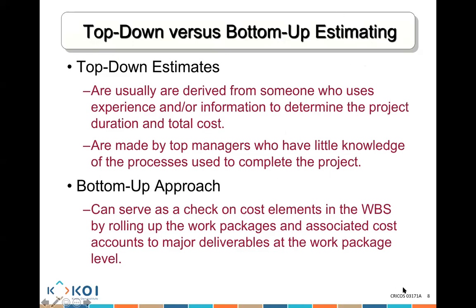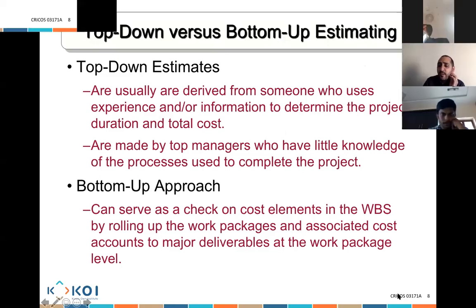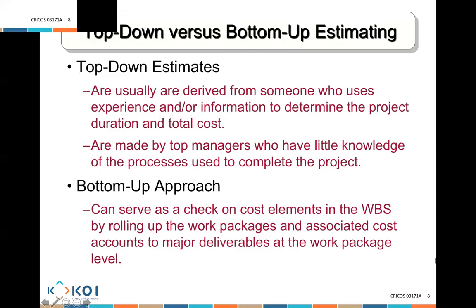Now, ladies and gentlemen, bottom-up estimates are the opposite. You know how we spoke last week about creating the WBS? It's like you use all of these WBS. You look at every work package in that WBS. And you say, all right, every work package, how much is it going to cost me? How much time is it going to take? And so on. So you get all of this detailed information that you have available, and you use that information to conduct your estimates.